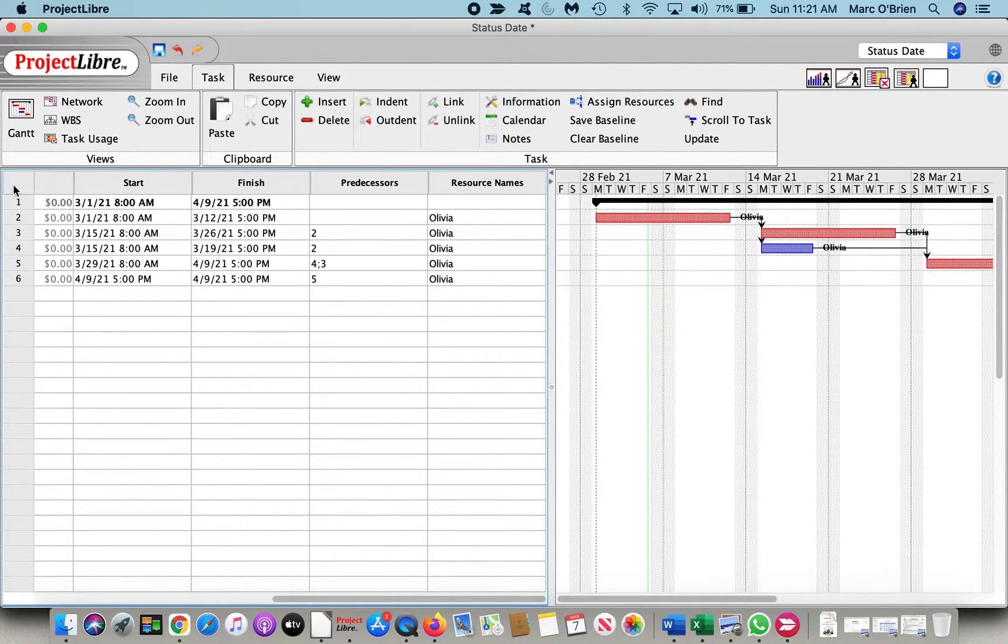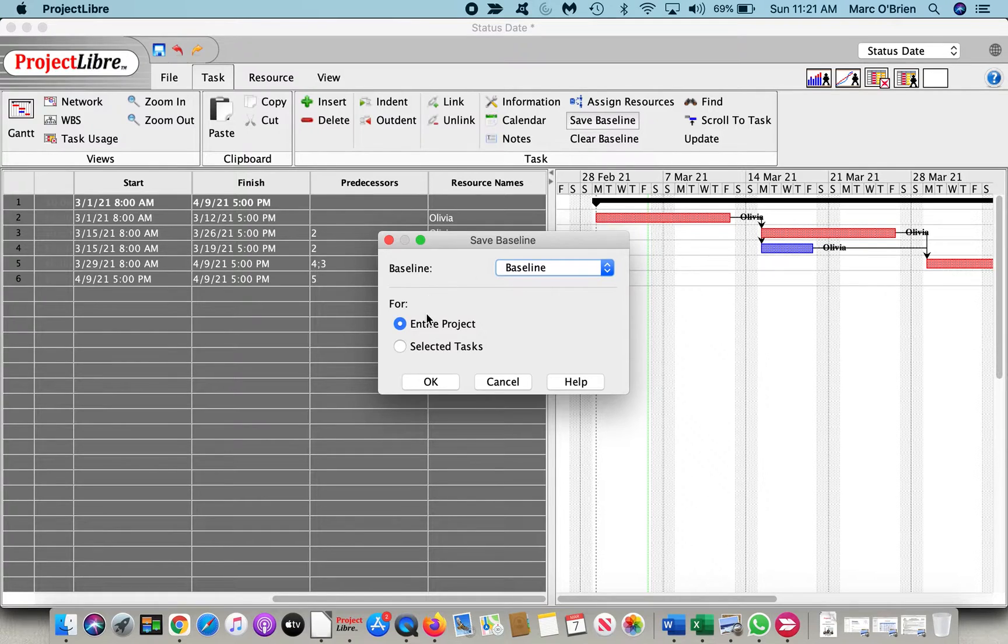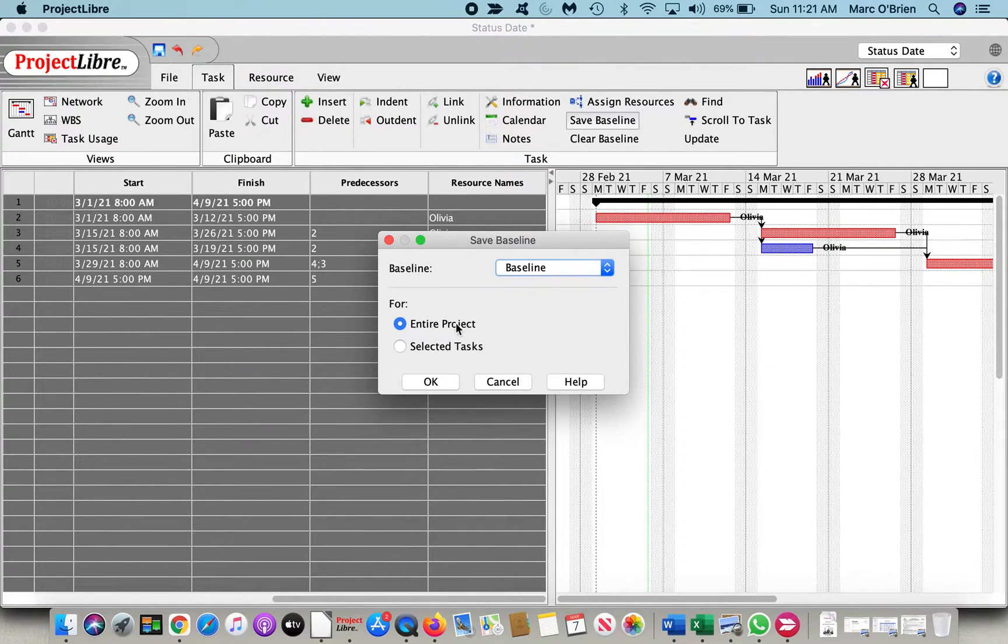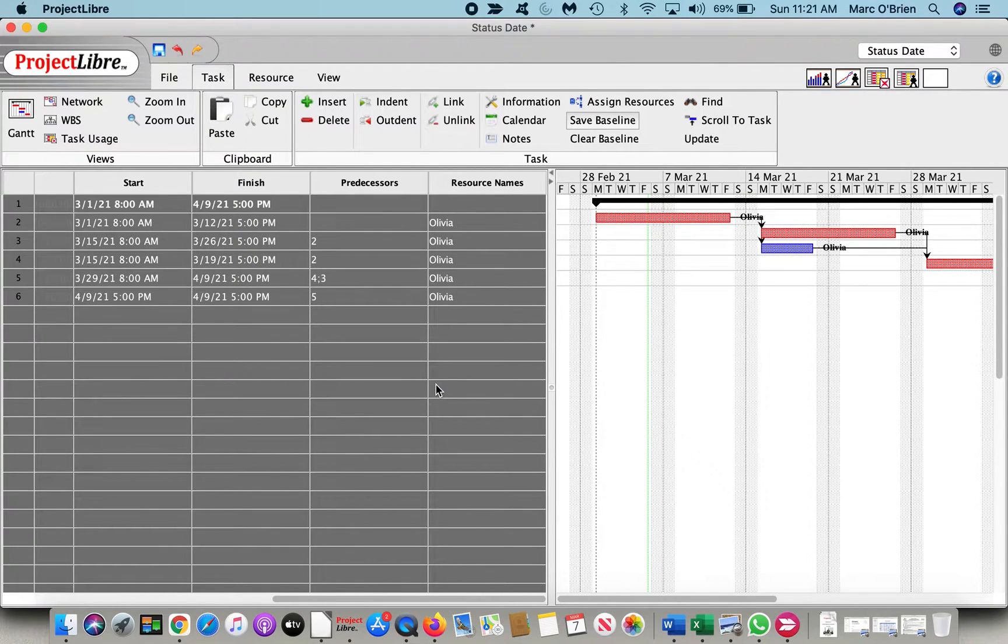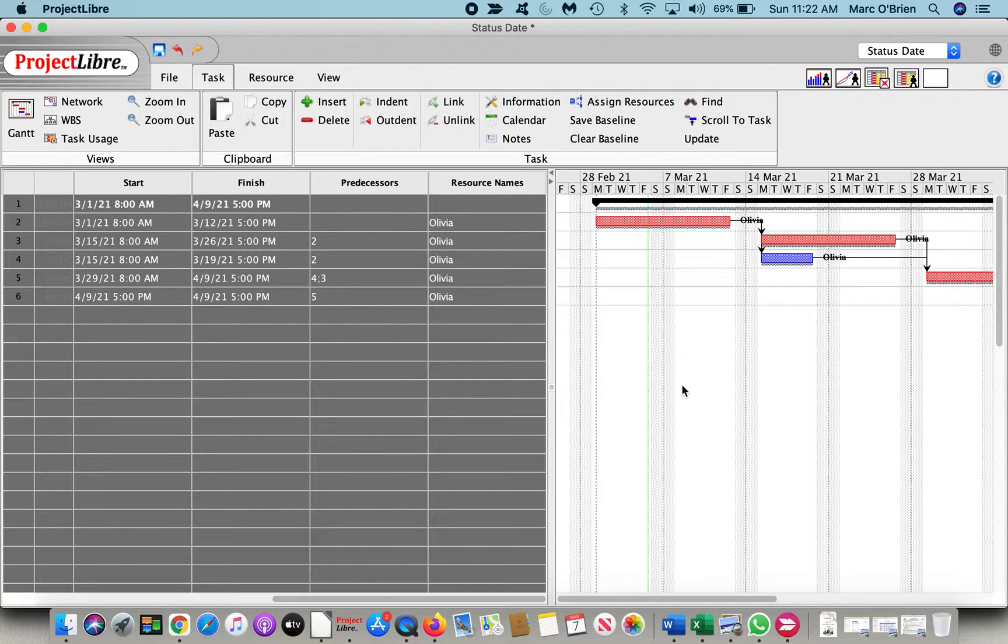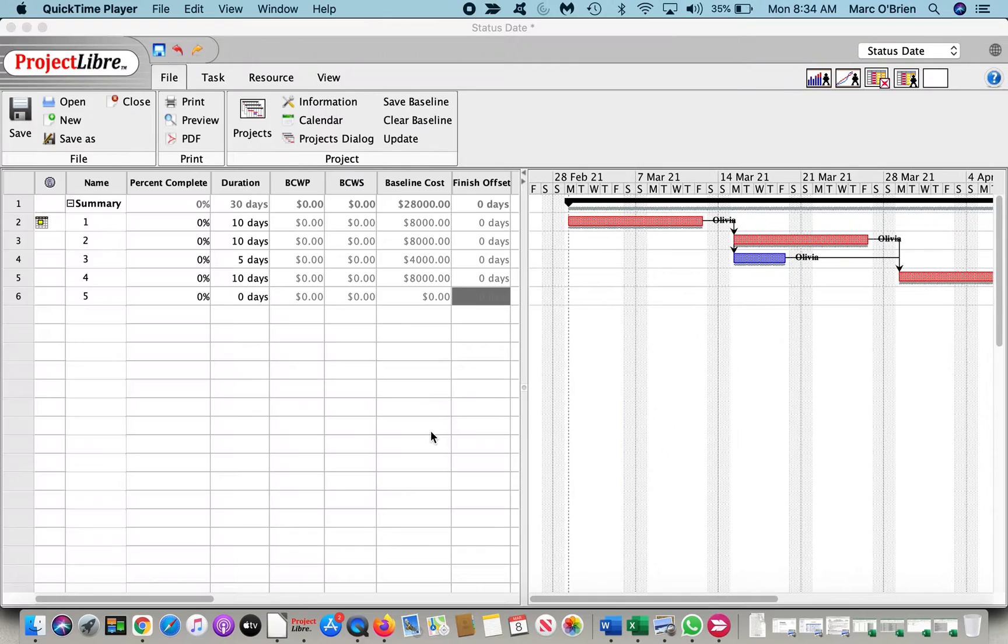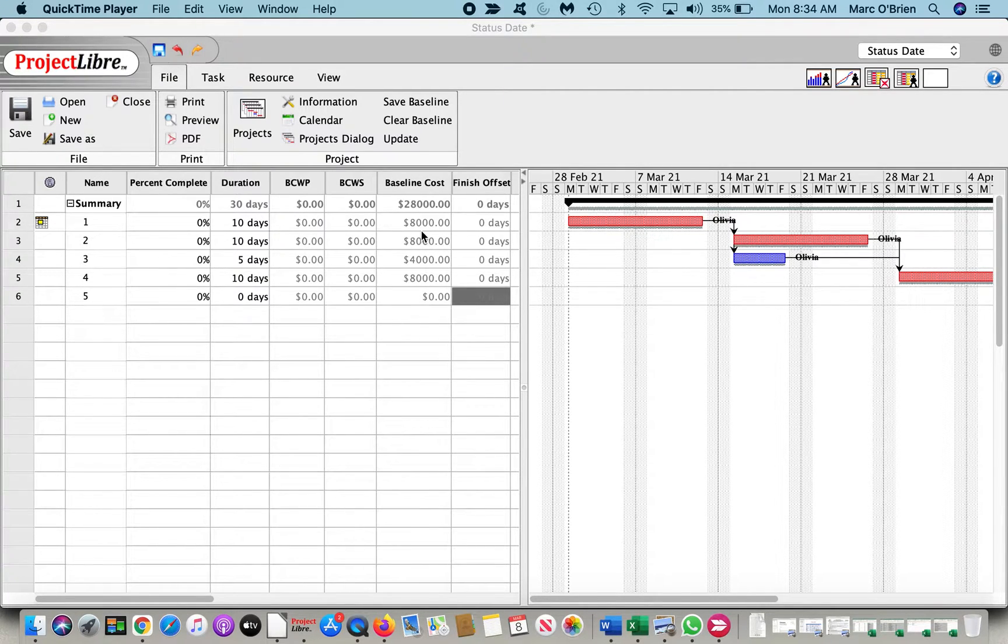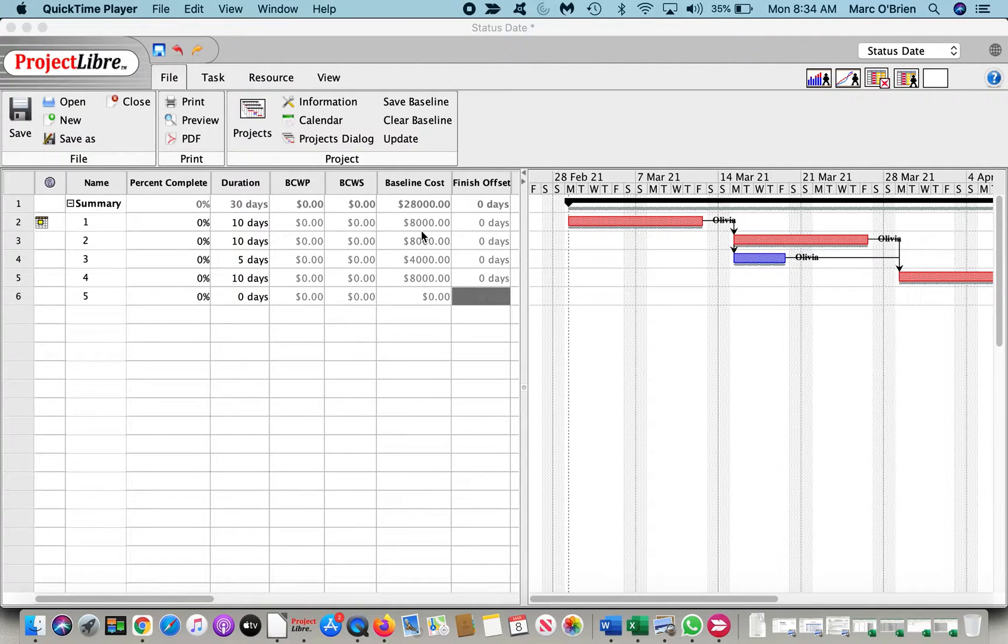I can now come through and highlight everything and say I'm going to save the baseline. And again, when you're saving a baseline, you can save up to 10 baselines, and you can do it for the entire project or selected tasks. We are going to baseline for the entire project, and then you can see the bar at the bottom there. If we look at our spreadsheet, the tracking of cost of the baseline cost is displayed here. Let's focus on task one. Olivia is assigned at $100 per hour for the 80 hours, or 10-day task. So as expected, the baseline cost is $8,000 when completed, but it does not signal how we are doing on the task.